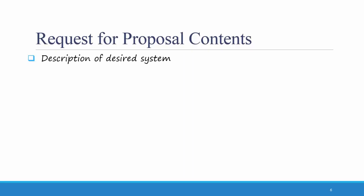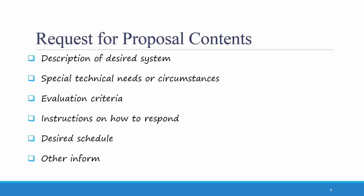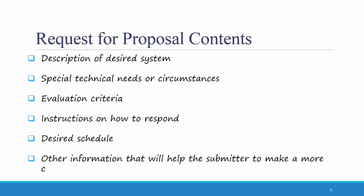What's included in an RFP, or the shorter versions RFI or RFQ? A Request for Proposal should include a description of the desired system, special technical needs or circumstances, evaluation criteria, instructions on how to respond, along with the desired schedule, and other information that will help the submitter make a more complete or accurate proposal.